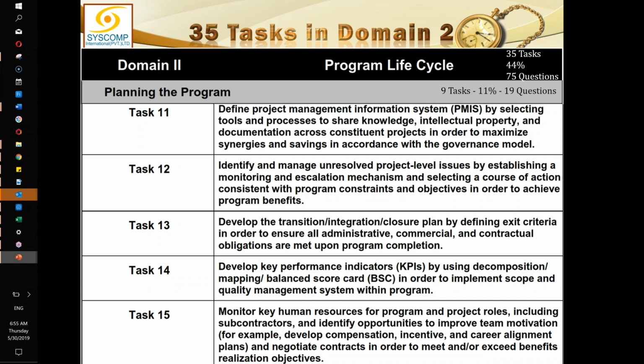Here, who is the project sponsor? If anything the project manager cannot resolve, it comes up to the project sponsor to decide, and whatever decision the project sponsor gives, that is final. Here, the project manager is subordinate to the program manager, and the program manager is the sponsor of the project. So all the issues which are unresolved in a project, and which the project manager doesn't have the power to resolve, will have to be escalated to the sponsor, and in this case the sponsor is the program manager. So the program manager must be mindful that such issues will be coming to him, and how will he be able to deal with them.